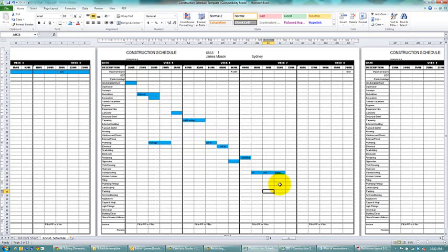So you can see coming down through here how it's all sort of cascading down. This is critical path, and a lot of it's pretty common sense sort of stuff. You know, you can't start the waterproofing until you strip out the bathroom, and you couldn't start tiling until you got all your services in. I can do this pretty quick because I've been doing it over the years, but it's something that, like I said, is pretty common sense, and you'll get a bit of a gauge of it as you go through.